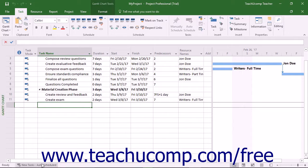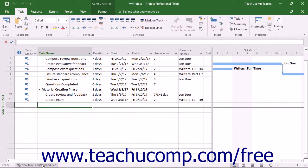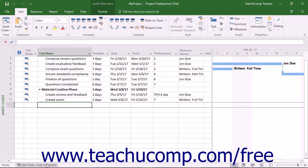For most projects where you want to have the ability to change the duration of a predecessor task, and then have Project automatically reschedule the linked dependent tasks, you will want to create the tasks using the new tasks auto-scheduled task mode. We will discuss this feature in the chapter on tasks.